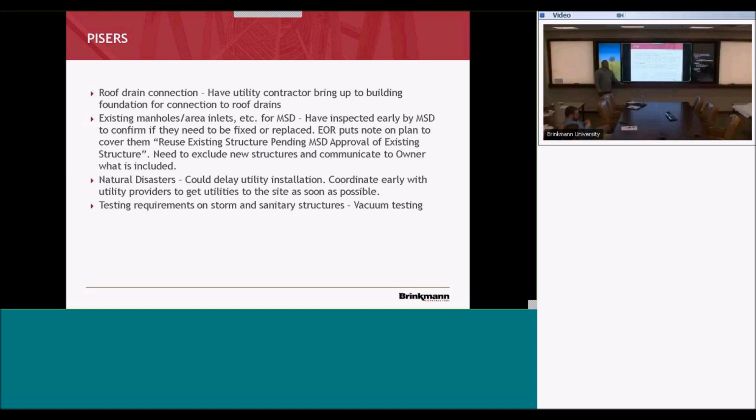Got a pitfall from Main Street, Omaha. Last week we were on site and we were preparing to destroy our detention basin. The landscape drawing shows to use a fescue mix, but on the civil sheets it shows the bioretention soil with plugs. So once again, cross-reference when you do your check set, and make sure you've got your ducks in a row. I don't know how the design team missed that.